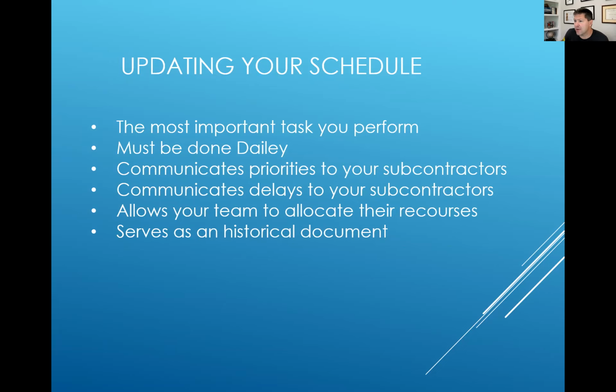Updating your schedule communicates priorities to your subcontractors, so they know what's important, when to be there. It communicates delays to your subcontractors, because you don't want them to show up and not be able to work. That's a problem, because the next time you need them to show up, they may say, you know what, you're probably not going to be ready for me anyway. I'm not going to be there.